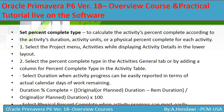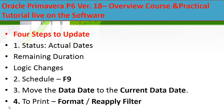You also have to agree on the percent complete types. In Primavera you have physical percent complete, where you measure the actual progress on site manually. You have units percent complete, which is tied to the resources. And you have duration percent complete, if you measure progress based on durations. I will show you that now in the live software.